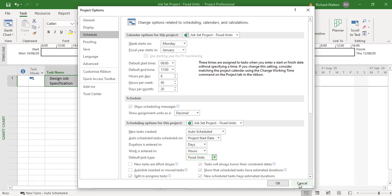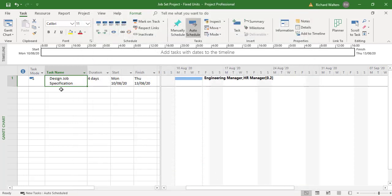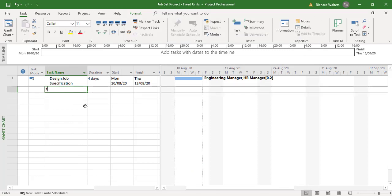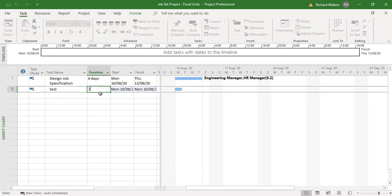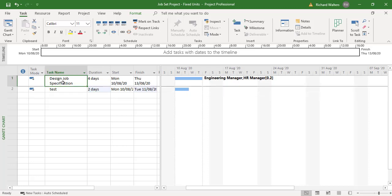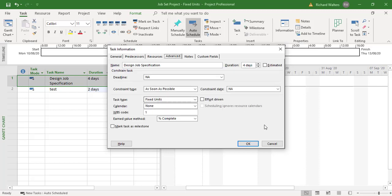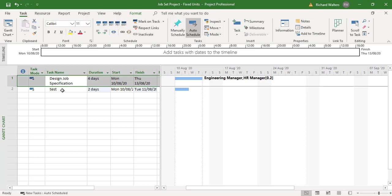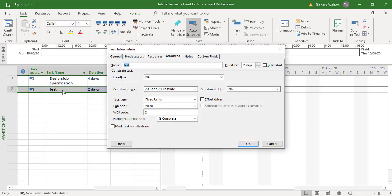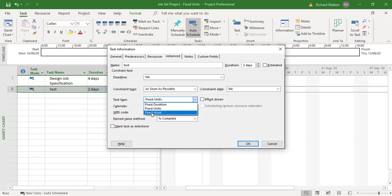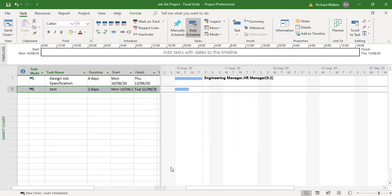You can mix and match task types. For example, if I type in a task called 'test' and put a two-day duration against it, the first task has the default which is fixed units. For the test task, I could change it — fixed resource means fixed work, so we'll use fixed duration in this particular example. Let's see what happens when I add resources to this.